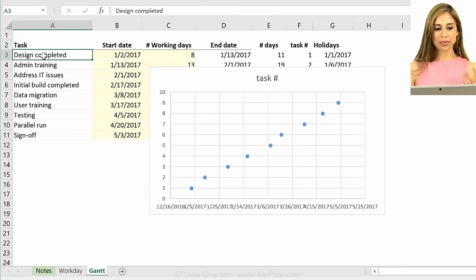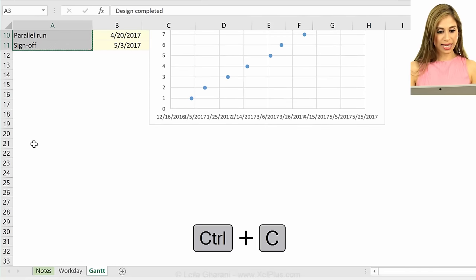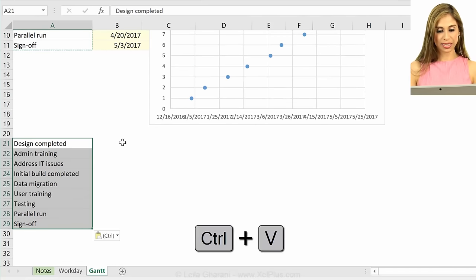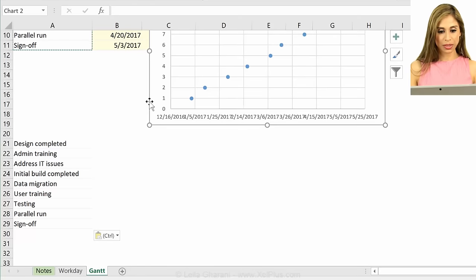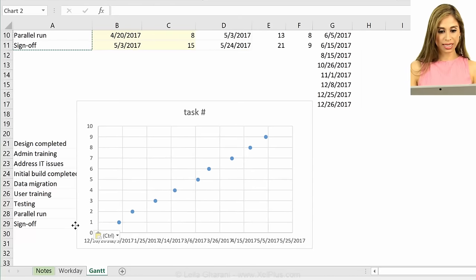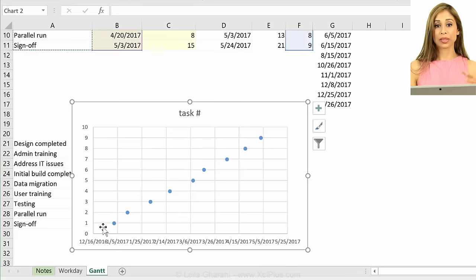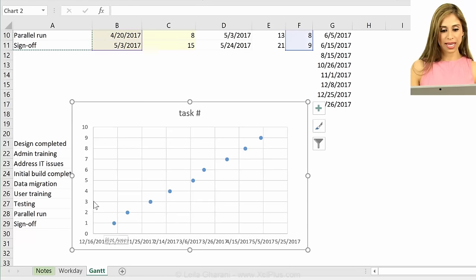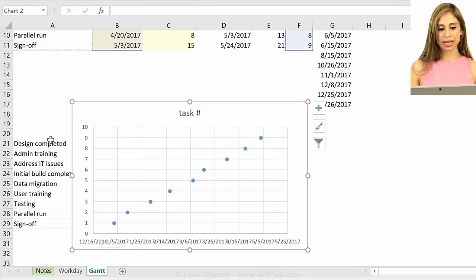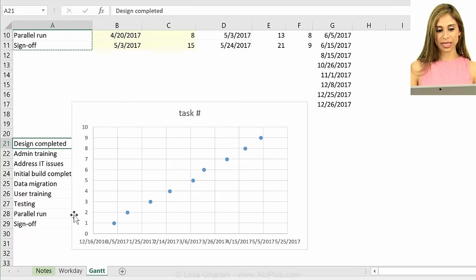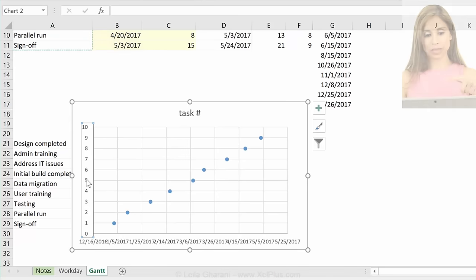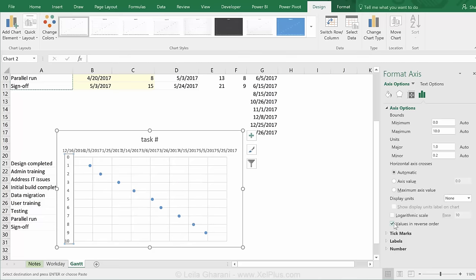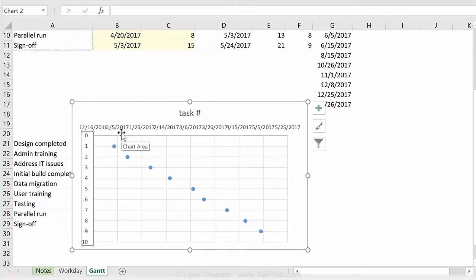Let's just make this more presentable. What I'm going to do is copy these tasks and paste them down here. I'm going to be putting this one here, so that's the aim of putting this in front. Now we can see this is reversed, because task number 1 is up here, and my chart is down here. So I want to flip them over. I'm just going to double click this, go to the axis options here, and click values in reverse order. So that switches them around.